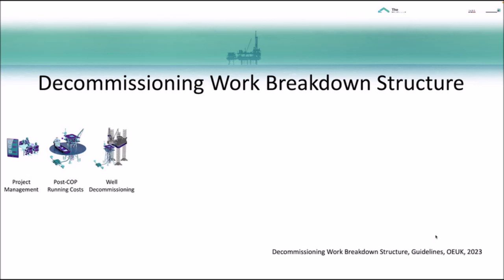This is followed by Phase 3, plugging and abandoning of the wells, which has financial and technical challenges. Once the wells are plugged, we can go on to Phase 4, process shutdown, isolation and cleaning, prior to Phase 5, which is preparing the topside for removal. In this again, there are cost implications and technical challenges.